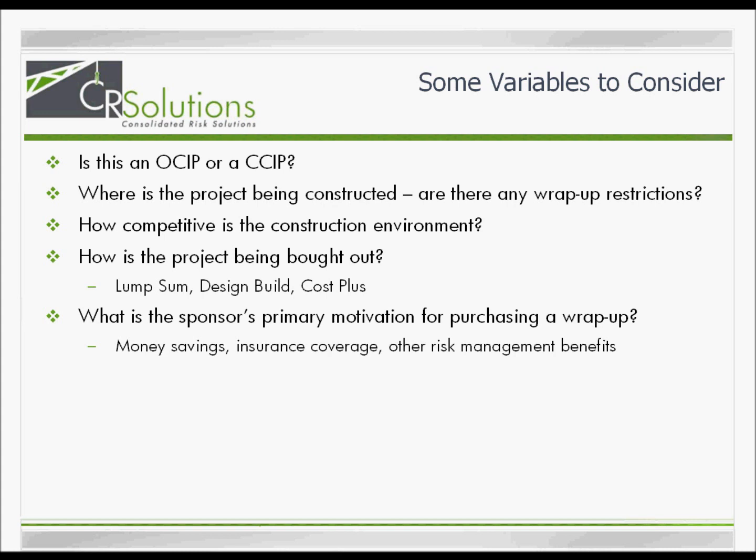Where is the project being built? Some states and local governments may have restrictions in regards to construction bids and/or wrap-up insurance programs, which may dictate which method should be used. How competitive is the construction environment at the time of the bids? In a competitive environment, contractors are more likely to remove all of their insurance costs.